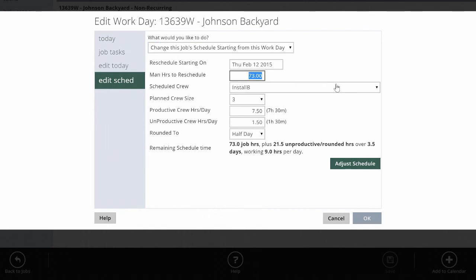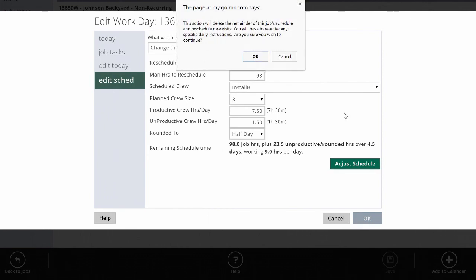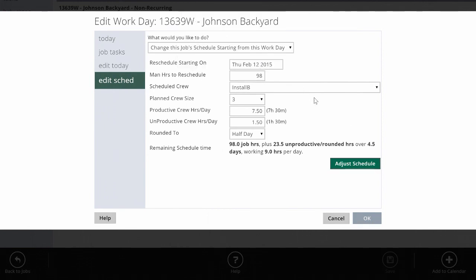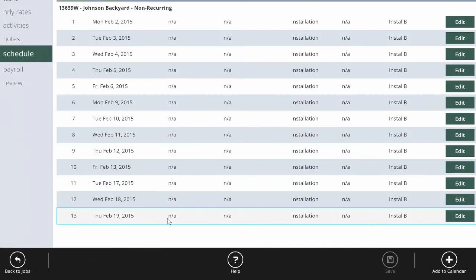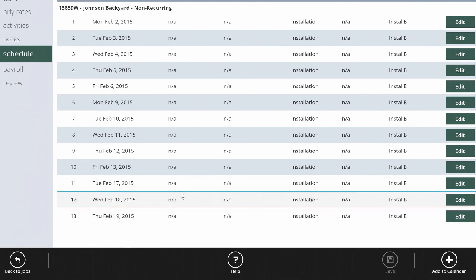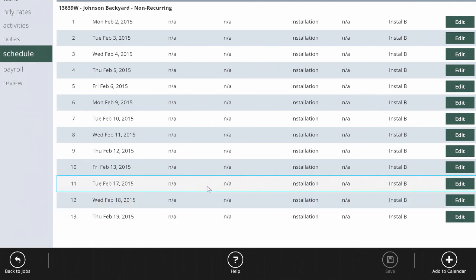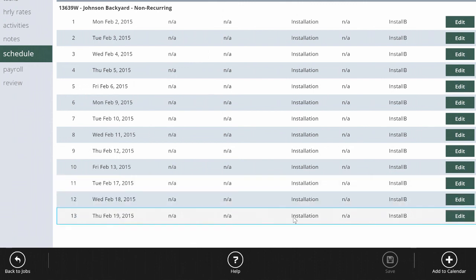If that's incorrect, maybe we're ahead of schedule, maybe we're behind schedule, and let's assume we're behind. If I still estimate that I've got at least 98 hours left, I can change that and hit adjust schedule. It'll automatically remove the rest of the schedule for 72 hours and recreate a longer one to make sure I get the full 98 hours worth of work that we know we have left to do, so that I don't end up with scheduled jobs always crashing into each other or not leaving myself enough time to get them done.